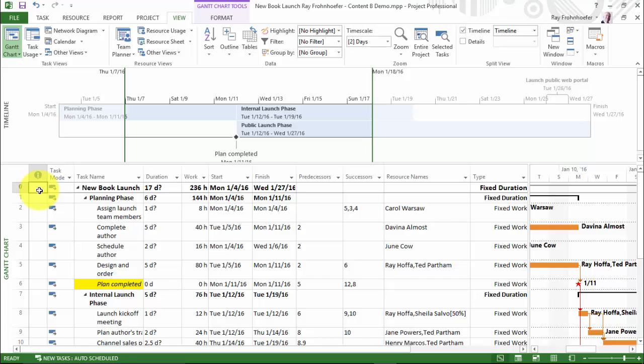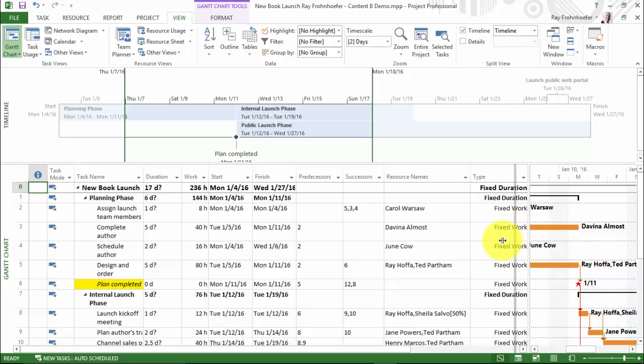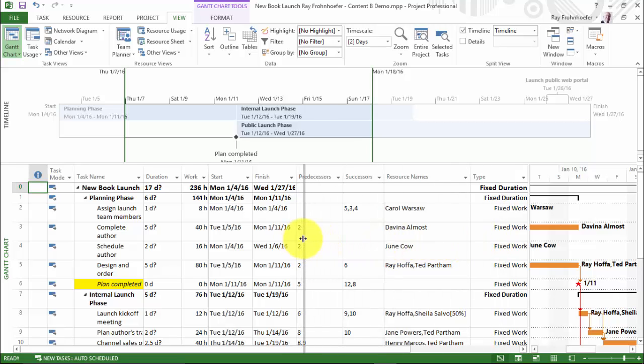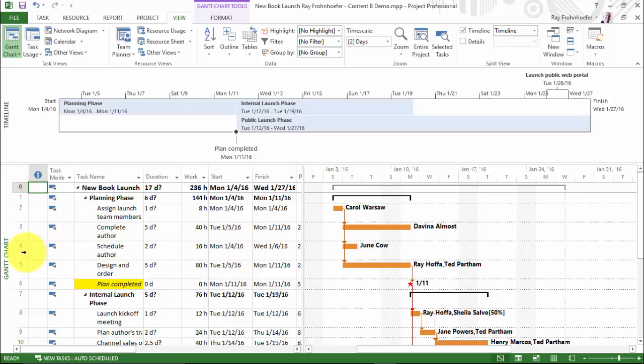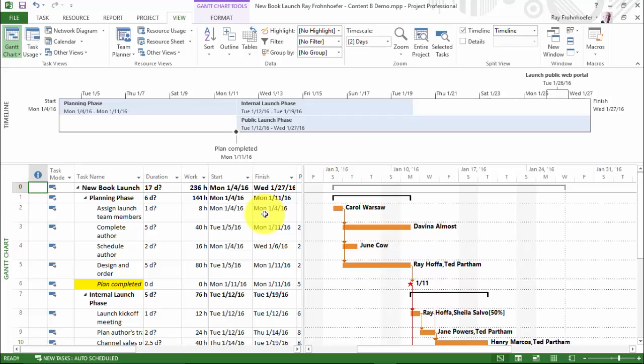Now the other interesting thing here is that the size of the window pane determines what gets printed. So if I pull the pane all the way back to here, when I print I'll only see these columns in the entry table. So let's take a look at that. It should go from task mode to the finish date only.